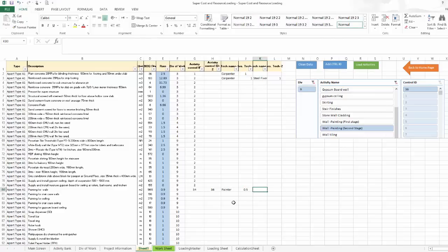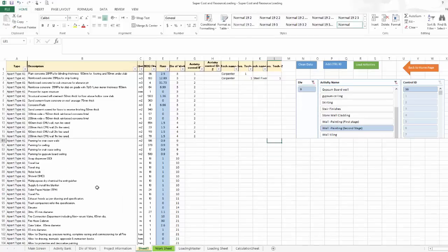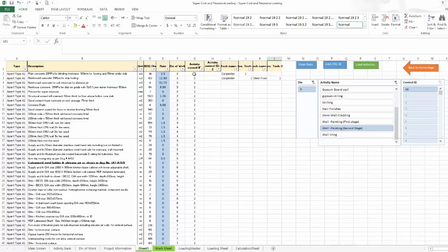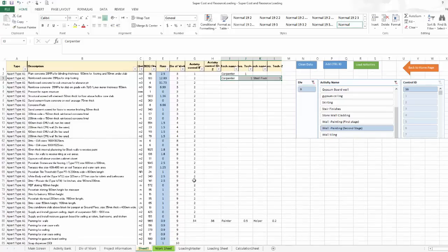I'll put here the technician name 'painter' and the productivity 0.5, and for the second stage the productivity is 0.2. I have to complete all the BOQ items like this. So I have only these cases: whether I have one activity and one technician, one activity with two different technicians, or two activities related to one BOQ item with one or more technicians.